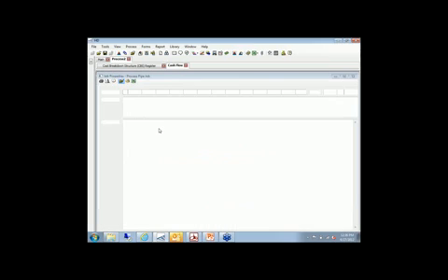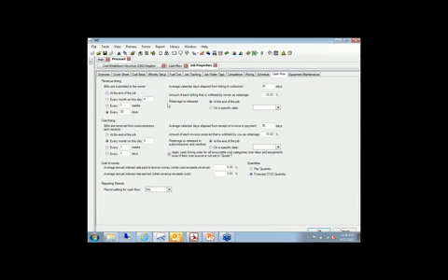Okay, so if we look at those timing options, you can see here as we look at it either from the owner's or the contractor's perspective, when are pay requests being made? Every 30 days. How long does it take to process those payments? 30 days in this case. 10% is being held for retainage. Okay, when do we get that retainage? Or if we're the owner, when do we pay the retainage? Costs coming in from contractors and subs and vendors, when do we pay them? We're saying, in this case, it takes 90 days to process those. And we can even deal with interest rates on shortages and surpluses and factor those in and calculate finance costs even. Okay, so all of those things affect that cash flow graph that we were just looking at.